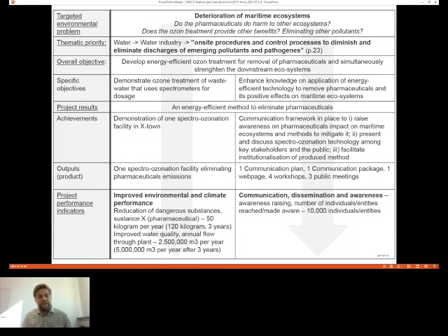But here you have to specify more measurable, and this becomes more clear when we come to the communication actions. We will deliver 1 communication plan that can be used towards the target groups in all of the European Union, perhaps 1 in Lithuanian and 1 in English. There will be 1 communication package, which we will describe later on, what can be included in that. There will be 1 web page. This is obligatory to have a web page.